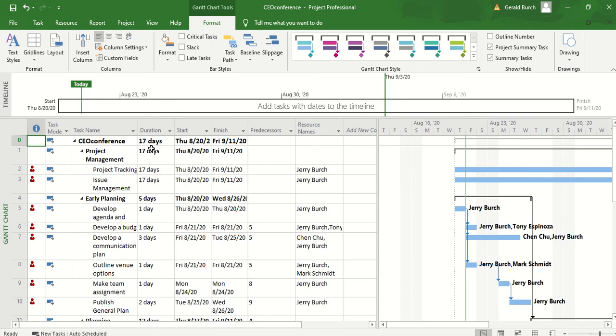Each employee can only work at most 40 hours per week. You also have administrative duties which require at least 8 hours of your time each week. So the most that you can work is 32 hours. So from our standpoint before, we know that I have over 450 hours that I have currently assigned to myself.